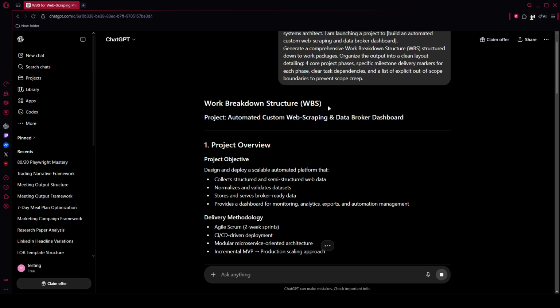constraints. For each risk, provide a precise, proactive mitigation strategy, a clear warning indicator that signals the risk is materializing, and an explicit secondary fallback plan to get the timeline back on track immediately. Use those indicators to build a lightweight monitoring checklist for your weekly reviews.